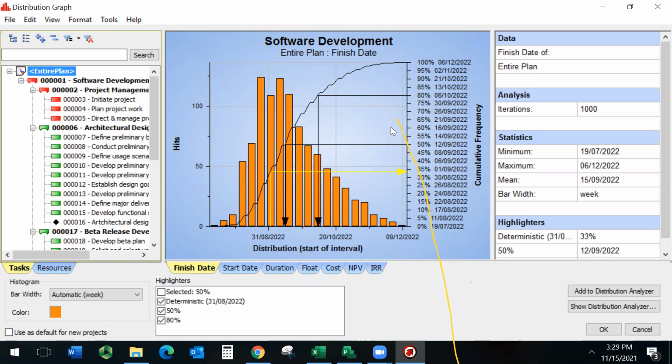And you can always go and model individually and work on those activities to create what we call a task existence risk. And it will have an impact on your Monte Carlo simulations, because sometimes the task will exist, sometimes it will not, but the results of the Monte Carlo simulations will be for the entire project.